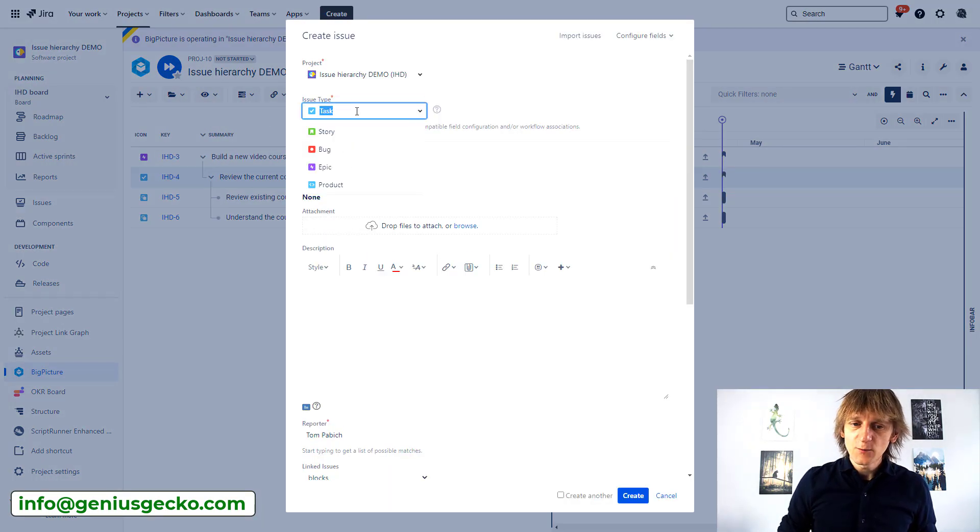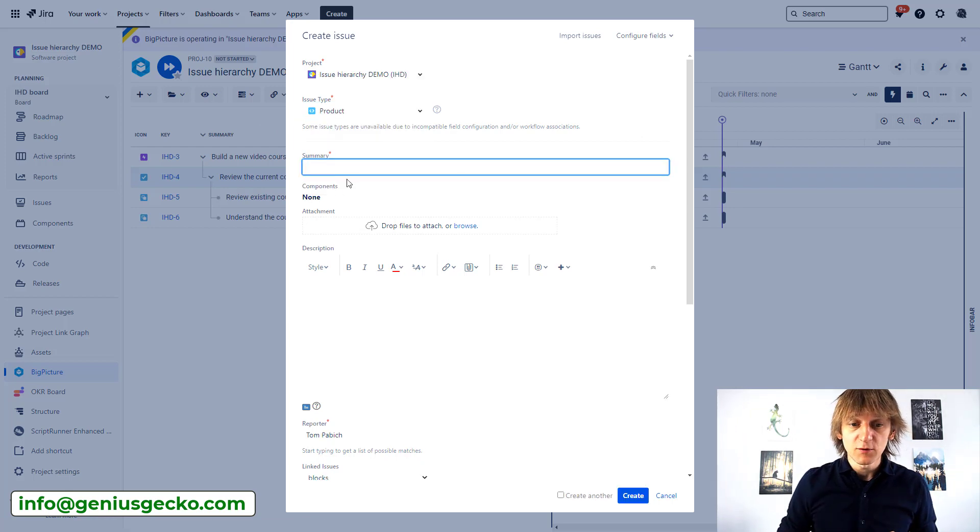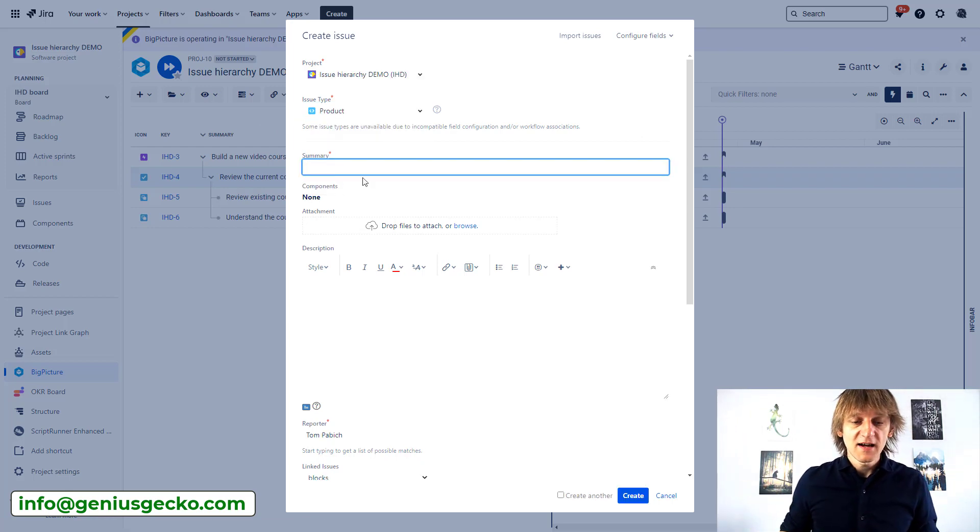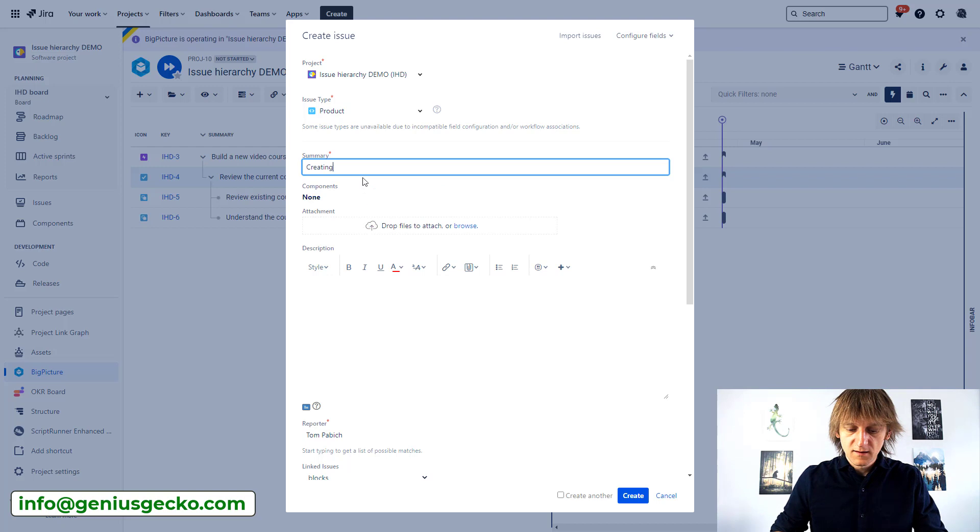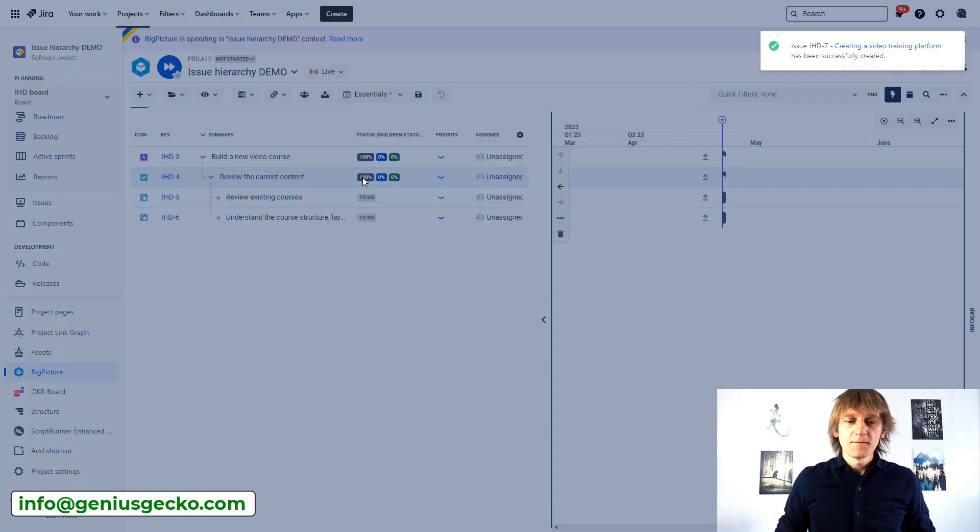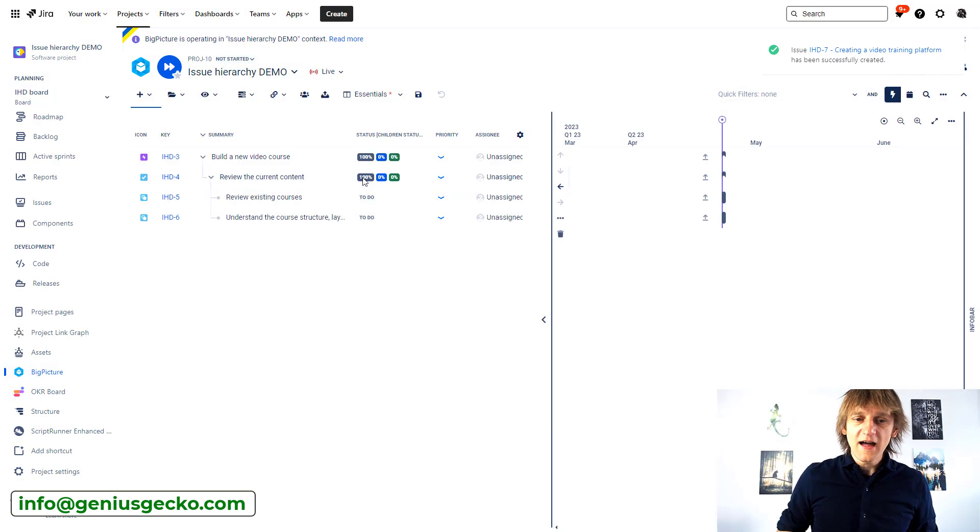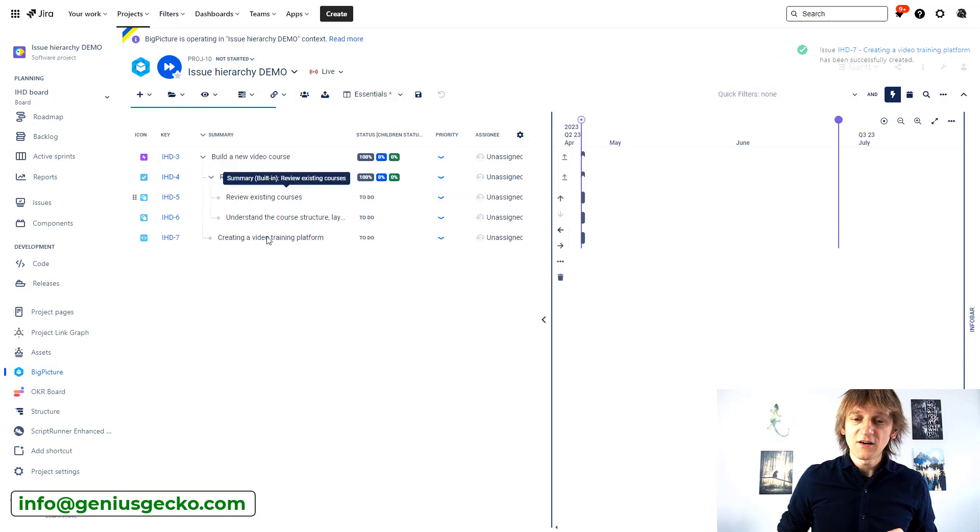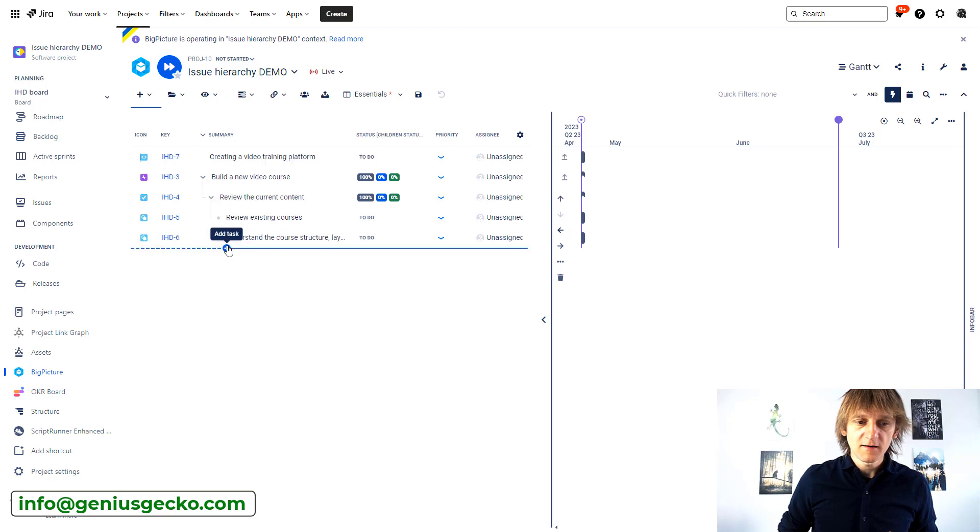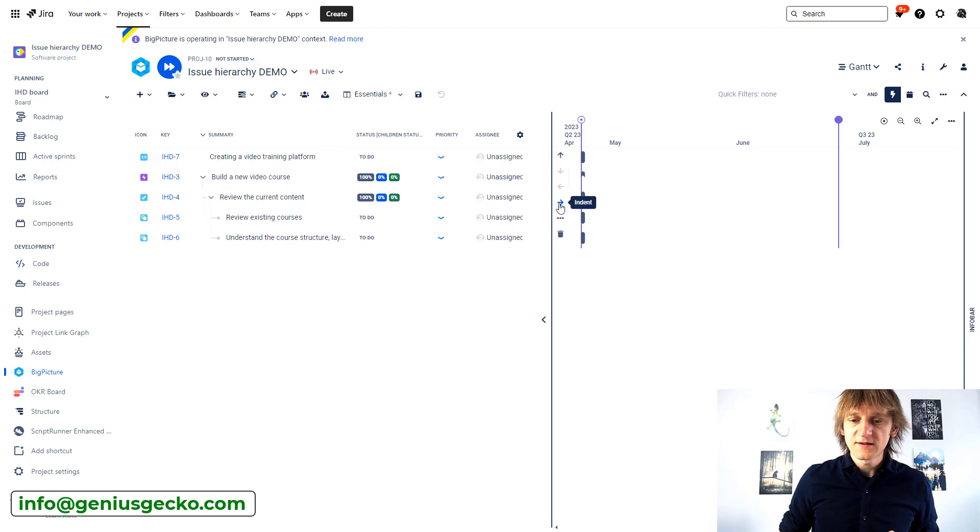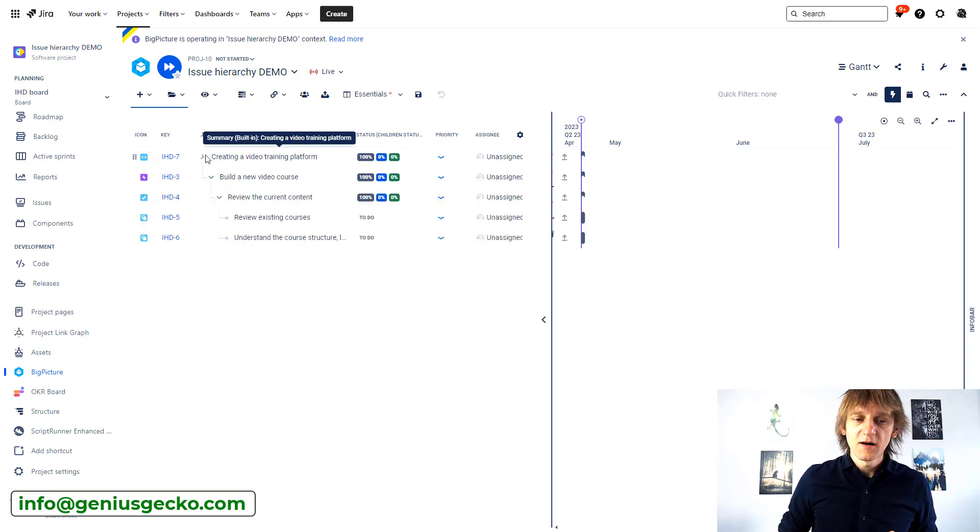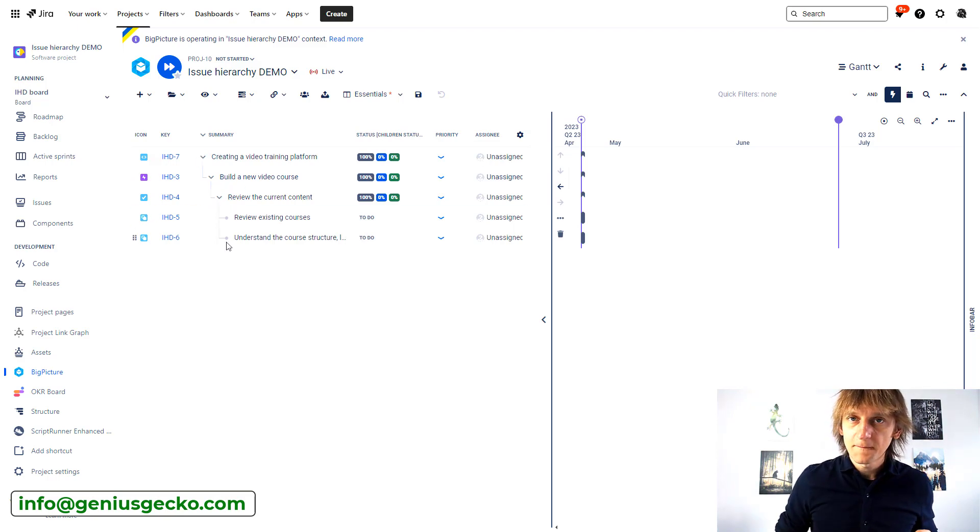So what if I would like to now add a new task to my Jira issues? And I would say that I want to add a Product that we've just enabled for our case. And we will say Build - Creating a Video Training Platform. And that's it. So let's do that. A new issue should appear in our Gantt-like view. There we have it at the bottom. We will actually move it now to the top, just like that. And what I will do is I will take the Epic over here and I will say now, I want to indent this Epic under my Product. Okay. And the hierarchy has been updated.